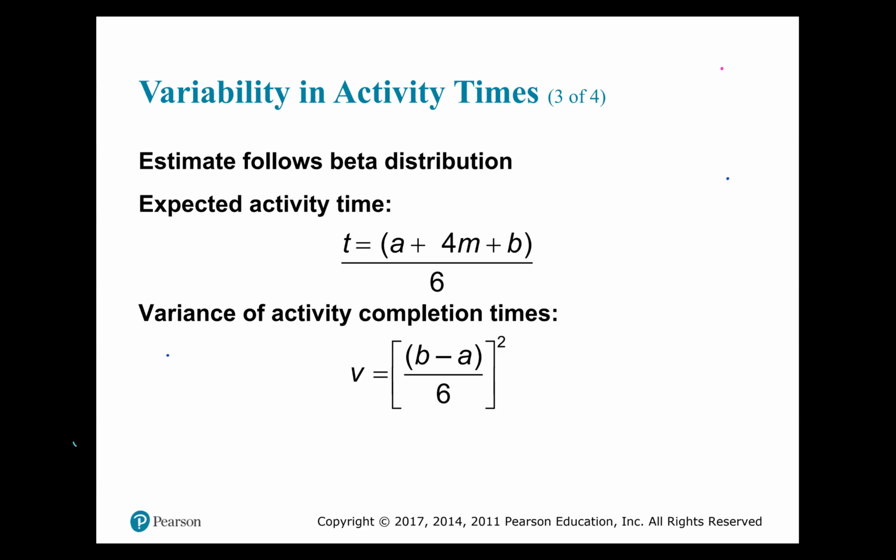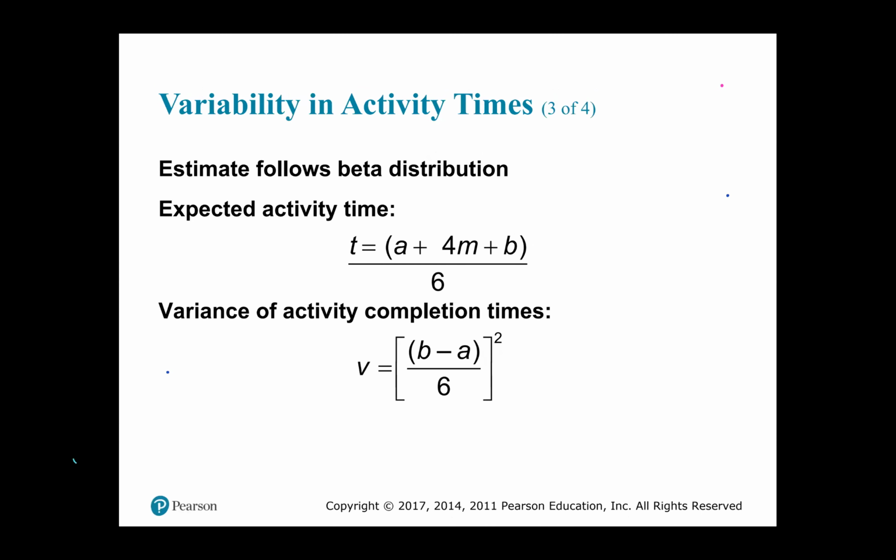A little bit of fancy footwork, I call it, using this formula here. So you're going to calculate the expected time. What are you going to do with the expected time? You're going to use it as the activity time, right?